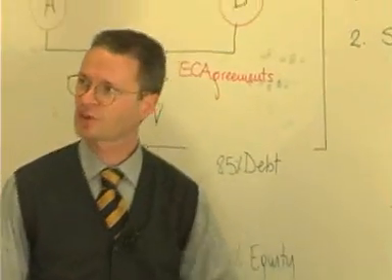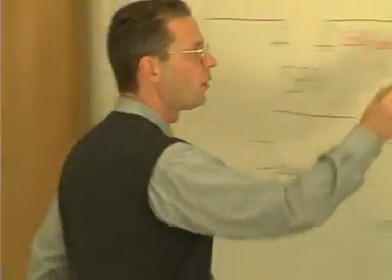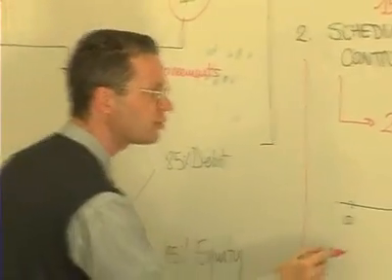Suppose that lenders are particularly reluctant to accept such an agreement. Which is the opposite alternative that you can negotiate with lenders in order to get very quickly the amount of money from equity holders? Very simple. Provide all the equity immediately, right before you use all the funds provided by banks. It is exactly the opposite direction. Okay? So the second alternative is all equity at the beginning of the project.